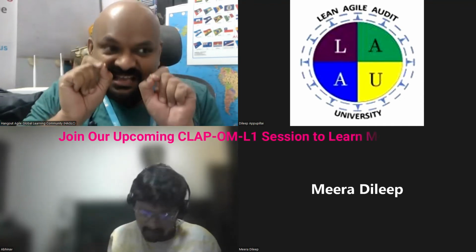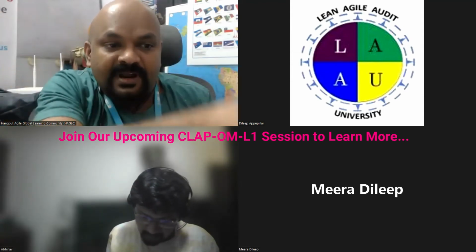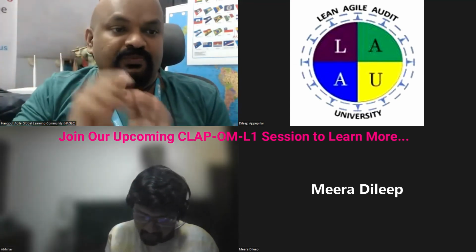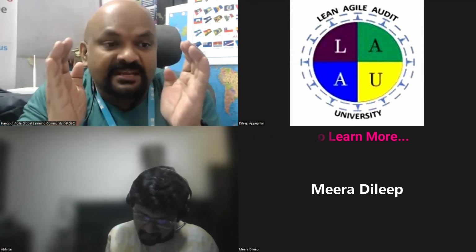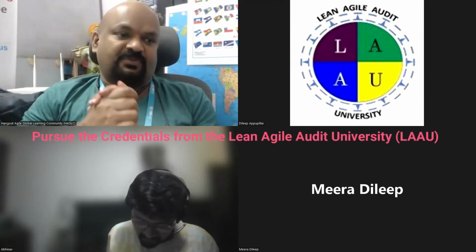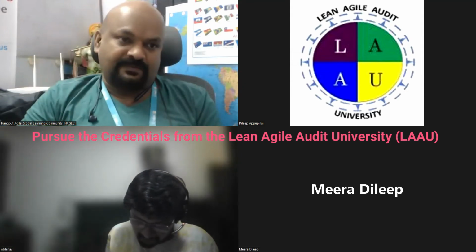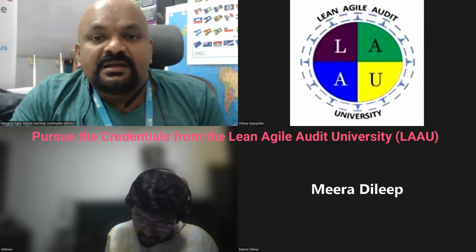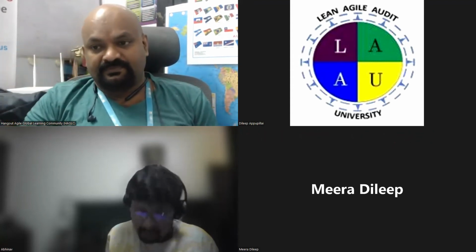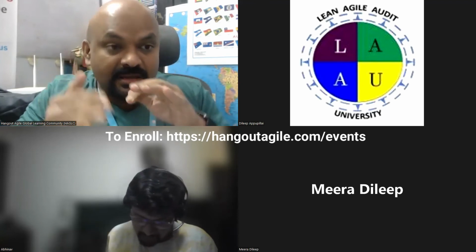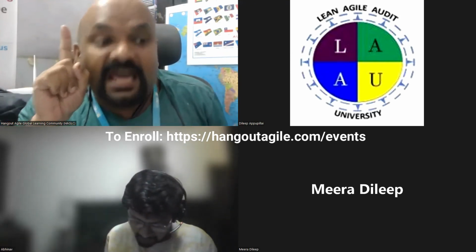Right. Correct. Got it. Yes. And for system lead time, the clock ticks when you pull an item from your input queue to your analysis. Then it ends based on the scope of your work. For example, if your organization is doing the UAT, then it ends at UAT. If your organization is providing warranty and support as per the contract, then it varies.